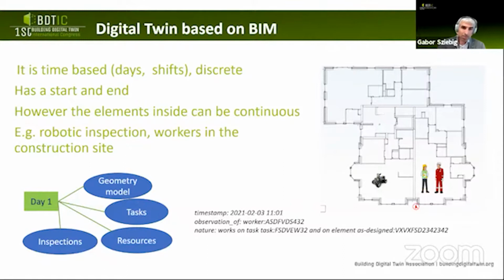We create a timeline of the construction site that will be part of the digital twin and includes all the information, be it a task, a construction step, or a resource, such as robots and humans working there, in a timestamped, time-based database way, with everything included.